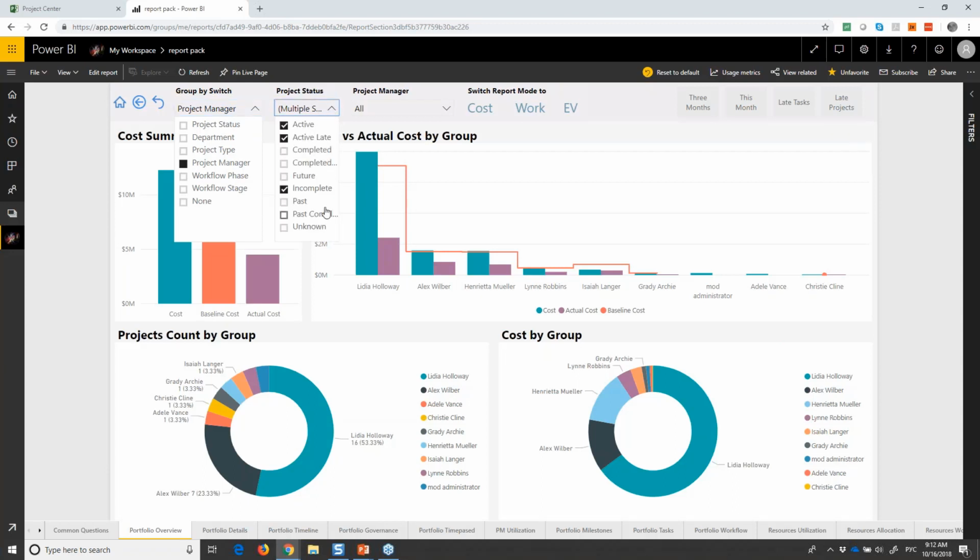We added several project statuses that are calculated. I would say they are artificial. They're not linked to a specific field, it's all based on the status. For example, whether the project has variances, has late tasks, is late compared to the baseline, or is completed or not completed. Our customers find that much more helpful.